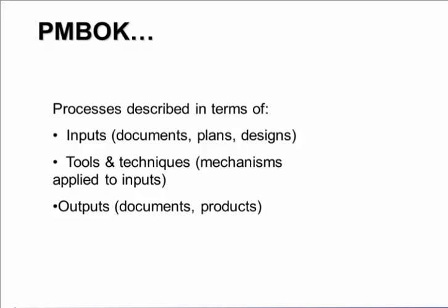And it could be, for instance, if we're using the wrapping machine, it's a purchasing phase, it's a design phase. The design phase has to include mechanical movements, thermal processes, electrical infrastructure, structural adjustments, all of which are there to create the outcome.